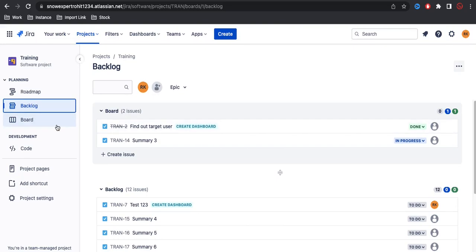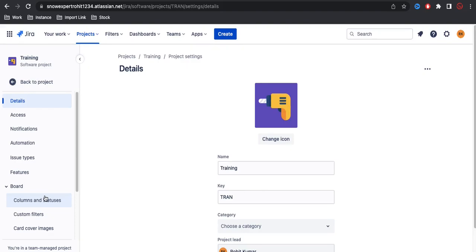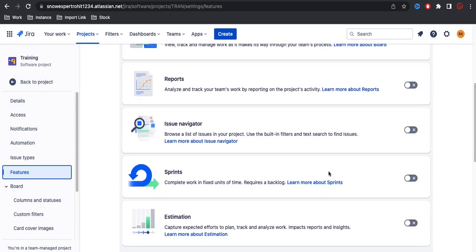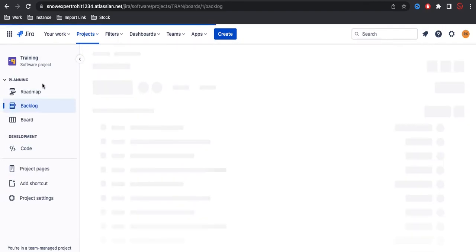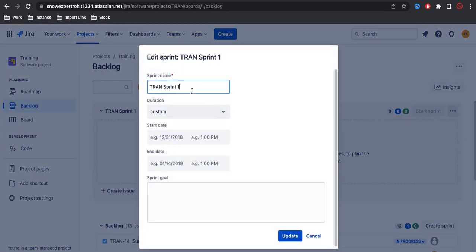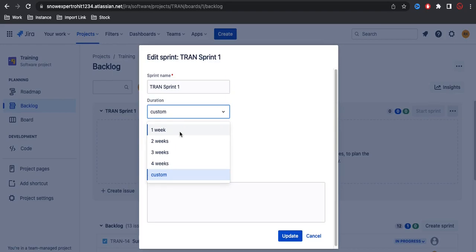Let's create a sprint - let's enable the sprint. To enable the sprint, we go to the project settings again. Under project settings we have Features, and under Features you will be able to see the Sprint option. If you turn on the sprint and go back to the home page, you can see under the backlog there is now one sprint enabled, called Sprint One. From the sprint you can directly create issues and edit the duration and sprint name. So sprint name might be 'Sprint One'.